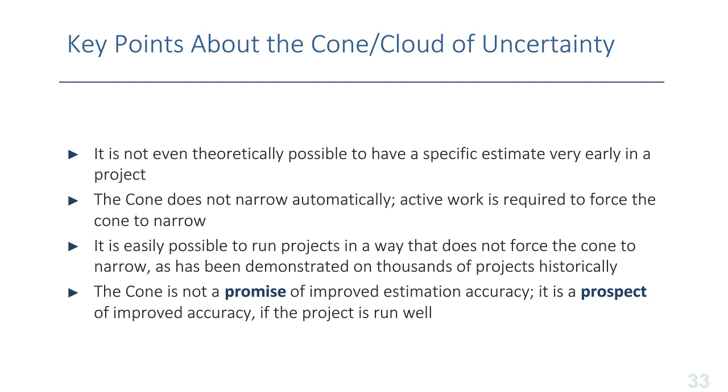So key points here really are it's not even theoretically possible to have a really specific estimate very early in the project. It is certainly possible to have a very specific target early in the project. It's possible to have.